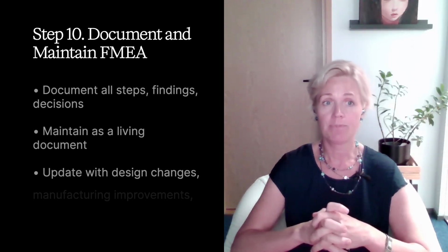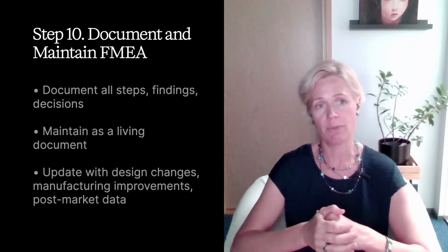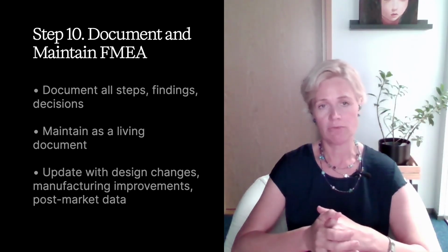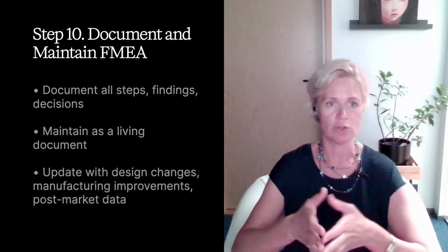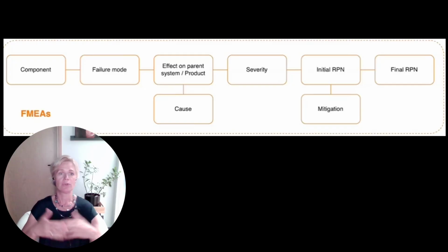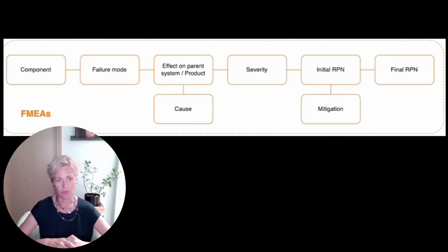And the final step, you need to document and maintain the FMEA. You need to document all the steps, all the findings and decisions in the FMEA worksheet and maintain it as a living document. You can update the FMEA throughout the device lifecycle. That should also reflect the design changes, the manufacturing improvements, and post-market surveillance data. So anything that comes from the users from post-market should also be included there.